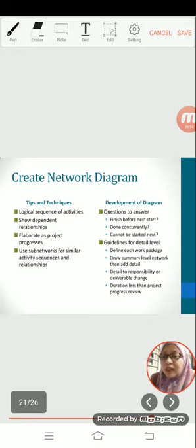Okay, the guidelines for the level of detail in the network diagram are: number 1, based on the work breakdown structure for a project, specific activities should be defined for each work package. Number 2, it may be preferable to draw a summary level network first that depicts a small number of higher level activities and then expand to a more detailed network.